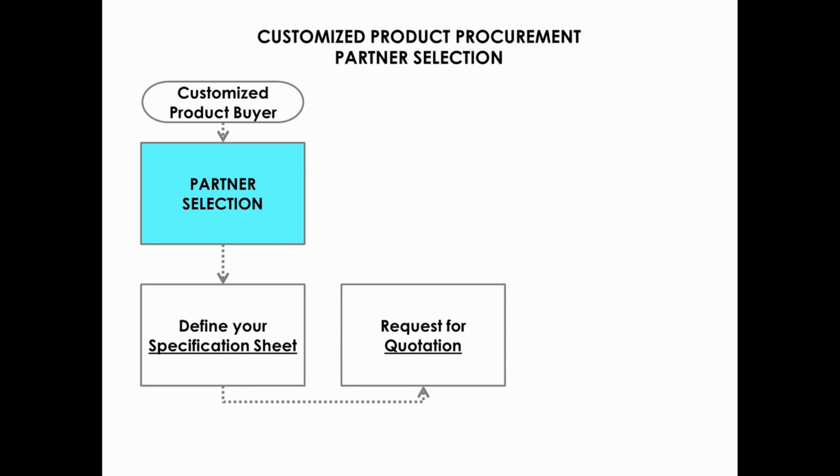It is often the case, and also good practice, to send out details of a similar product in order to get rough quotations first. This allows you to compare quotes from different suppliers without disclosing the full information to too many companies. Once you have a number of quotations in, you can compare these and select the suppliers you wish to send the full technical detailed RFQ pack to.